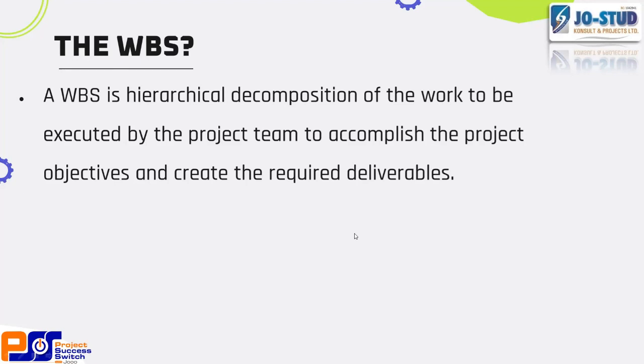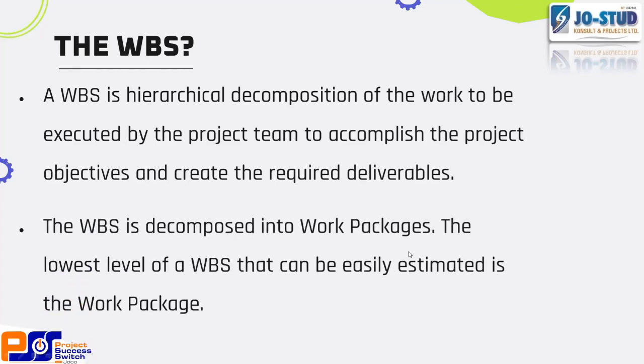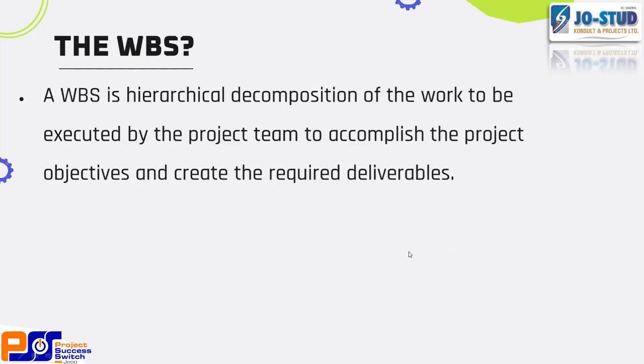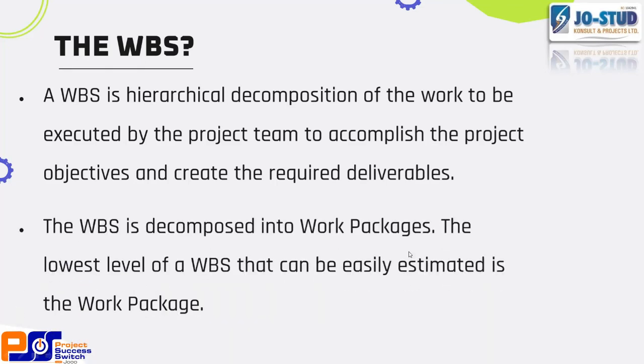So usually we number with very, very complex projects, but sometimes your numbering can get into level 4. It's part of what I wanted to show us on MS Project. Sometimes you can have 1.1, 1.1.1.1, 1.1.1.1.4. So it becomes very, very complex. But with MS Project, once you are done listing your activities on the software, it can just generate your WBS numbering for you. Easy.